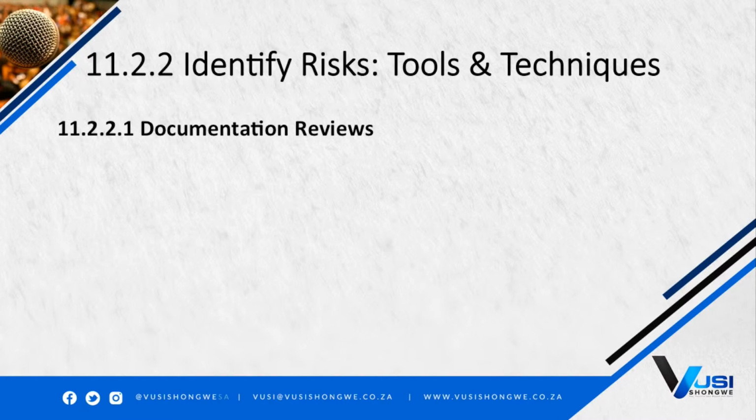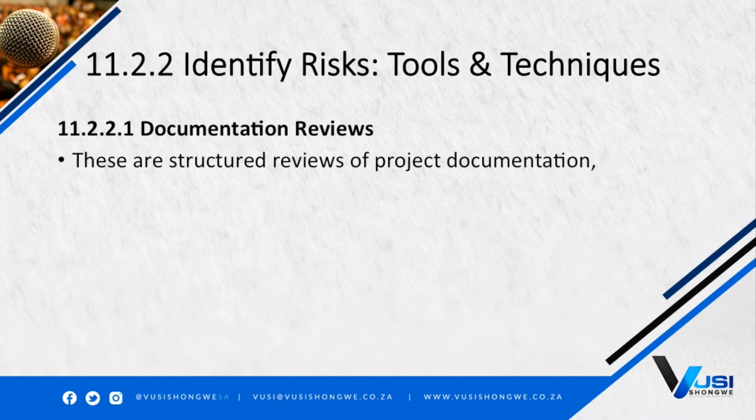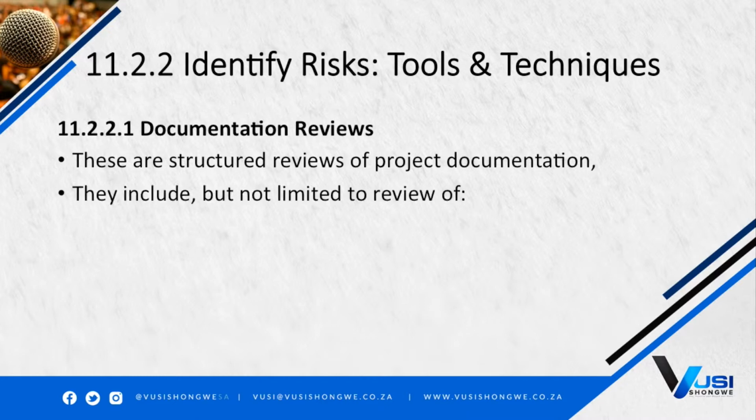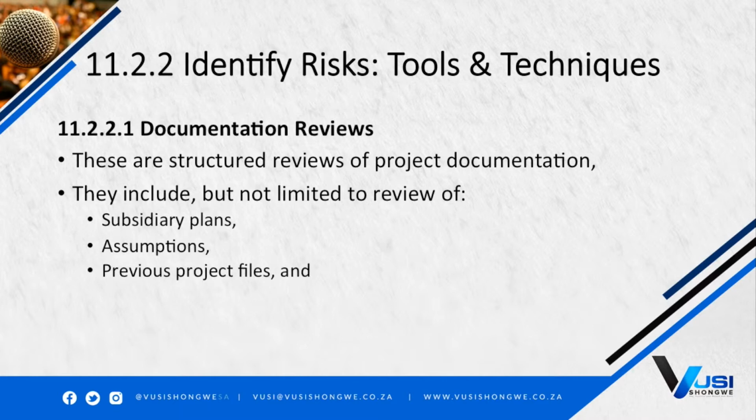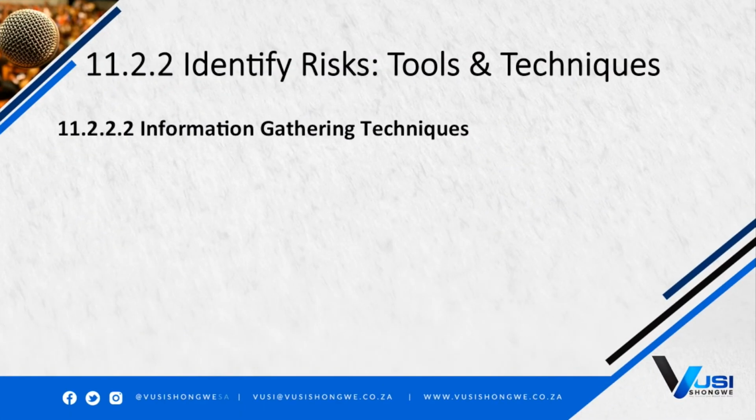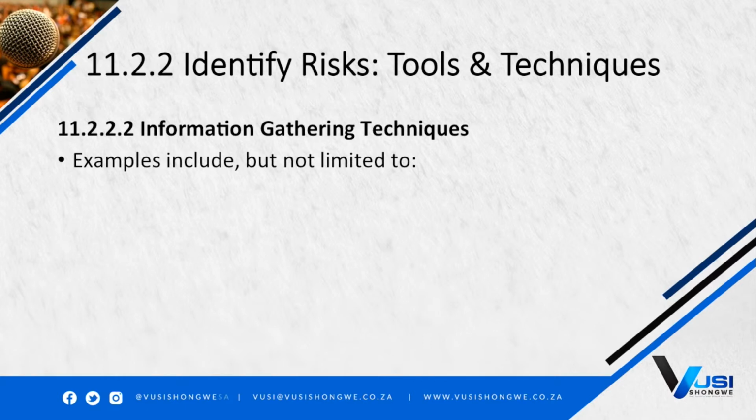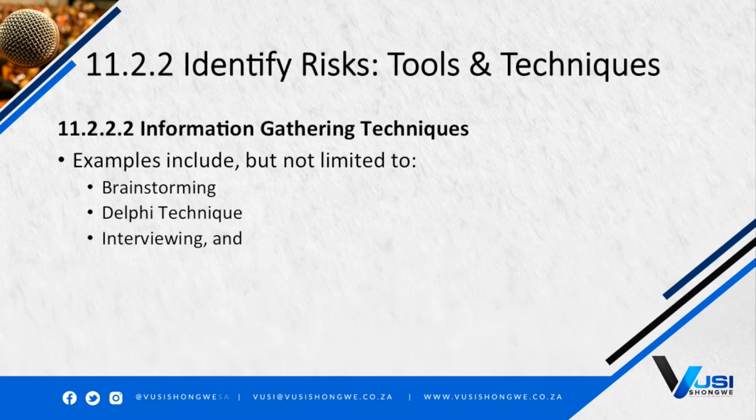Tools and techniques. Documentation reviews. These are structured reviews of project documentation. They include but are not limited to reviews of subsidiary plans, assumptions, previous project files, and agreements. Information gathering techniques. Examples include but are not limited to brainstorming, Delphi technique, interviewing, and root cause analysis.